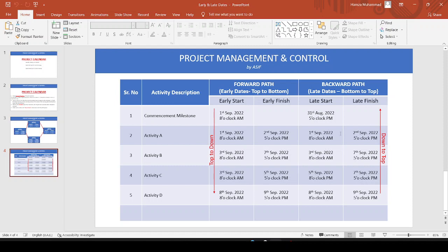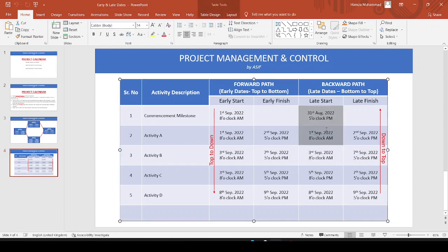Looking at the late dates, Activity A starts at 8 o'clock in the morning on 1st September. Before this is a commencement milestone. So if the early start is 8 o'clock, the commencement milestone should finish before this, making the late start 31st August at 5 o'clock in the evening. This means our early start needs to be adjusted — slightly after 8 o'clock — so that our late start will align to 1st September at 8 o'clock.